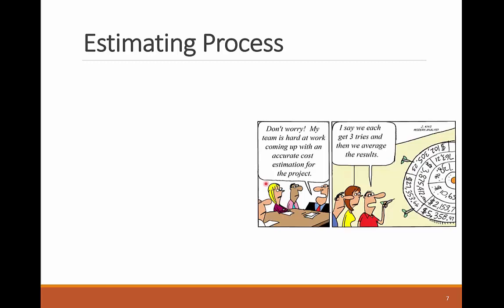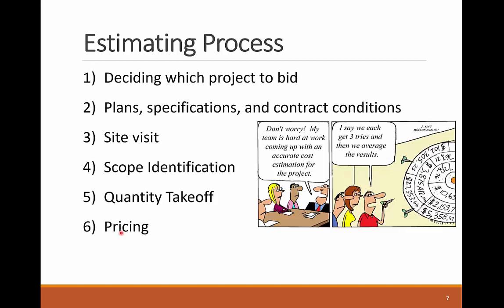Heavy construction projects usually follow a hard bidding process where the lowest bidder is awarded the project. Contractors need a systematic estimating process to develop complete and competitive bids to win the project while not being too far from the closest bidder. Being much lower than the next bidder can be very concerning, as it can mean the winning contractor missed part of the scope or used unrealistic assumptions in the estimate. Here you can see seven steps for the estimating process used in the industry. The first step is to decide if you will bid the project or not — you need the right experience, the project should not be too far from your company's base location, and it should be the right size for your company.